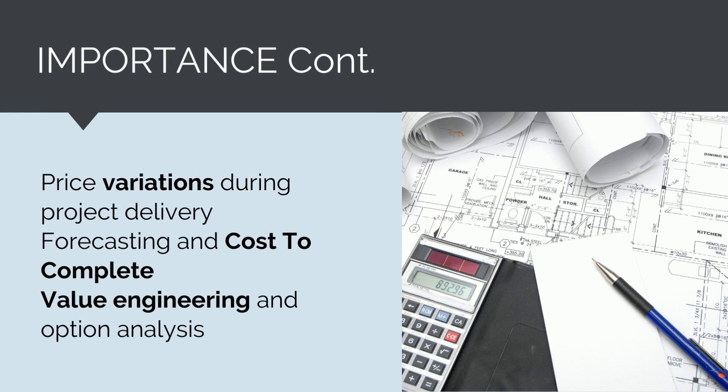Additionally, we'll use estimating to price variations during delivery — this is where the client changes scope and we need to work out our cost impact. Furthermore, as part of our forecasting and cost monitoring and control, we'll use estimating to calculate our cost to complete. And finally, being able to work out the cost of different options during delivery will be critical with value engineering and option analysis.